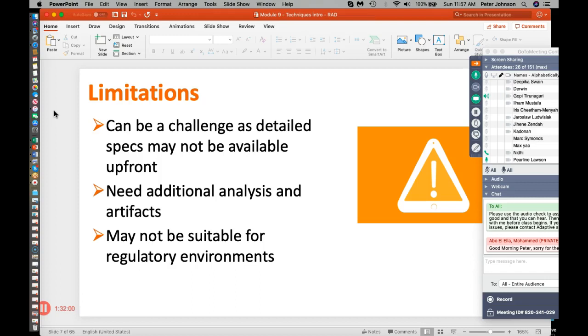Okay. In fact, I would prefer to start with high-level stories and then break them down. If I have my product backlog list, the items near the top are probably high-level stories, and I'm going to be breaking those down into lower-level, more detailed stories. Going back to that other question, that's where a business analyst can help groom those stories.